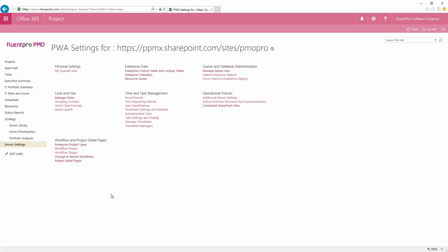If you are in Project Server security mode, every view is part of the security, and you can define that specific roles can have access to specific views. That functionality is not available in SharePoint permission mode. We recommend, especially if you start with Project Online, just keep it simple, keep the SharePoint security mode and forget about the permissions. Make sure that you get your people using the system and not worry too much about very specific and granular details about the security.